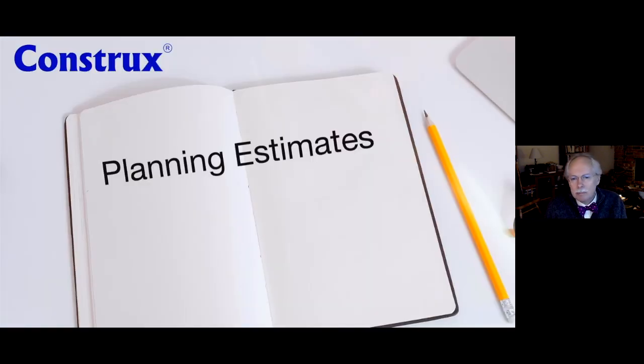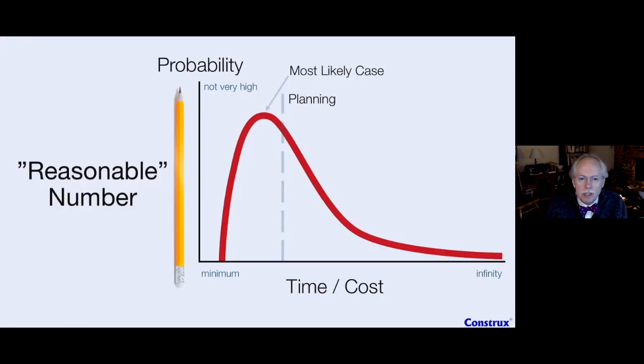My next estimates are my planning estimates. My planning estimates, when we come to think about it, are going to be using one of these 2 points on the curve. The planning point, which I used to introduce to you as the nominal. I'm renaming it the planning point now, because this is the perfect place to do planning. But we often start with the most likely case instead, because the planning number takes a little bit of math to get to. We might want to start with our best case. In fact, I like to start with my best case, then jump to my worst case, and then come back. And usually that's helped me find the most likely place, right? And then maybe from there I can get to the planning case.